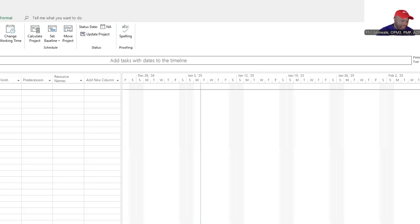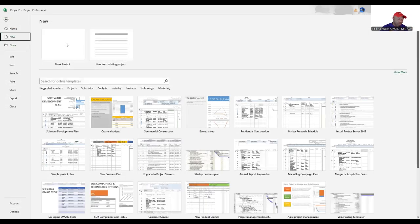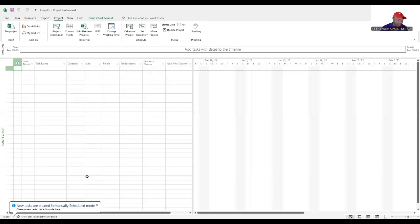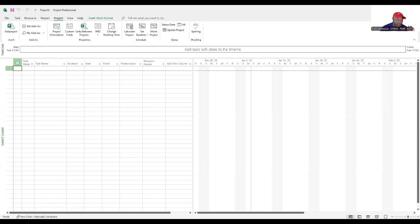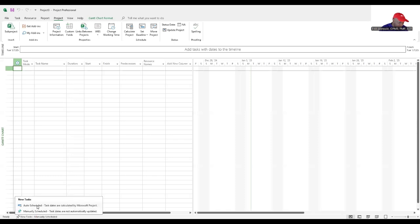When you get into the program the first thing you want to do is hit new and then blank project. Here at the bottom change this feature from new tasks manually scheduled to new tasks auto scheduled. We're going to change that from manual to auto.